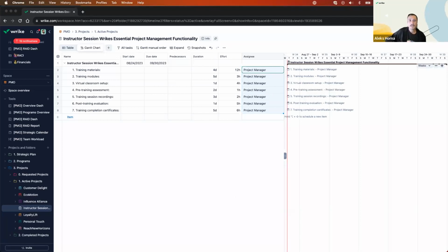Now, I've got a couple of questions kind of coming through, so I'm going to spend a second here to have a look at them if I can. I've got a question here on if we need to put effort per day or total hours of task. Great question there, Vikash. Thank you for it. That effort that we're putting in here is specifically the total amount of effort that you might spend on this task. This session won't cover the workload charts, but we will look to run a session on workload charts where you can then allocate specific effort to each day.